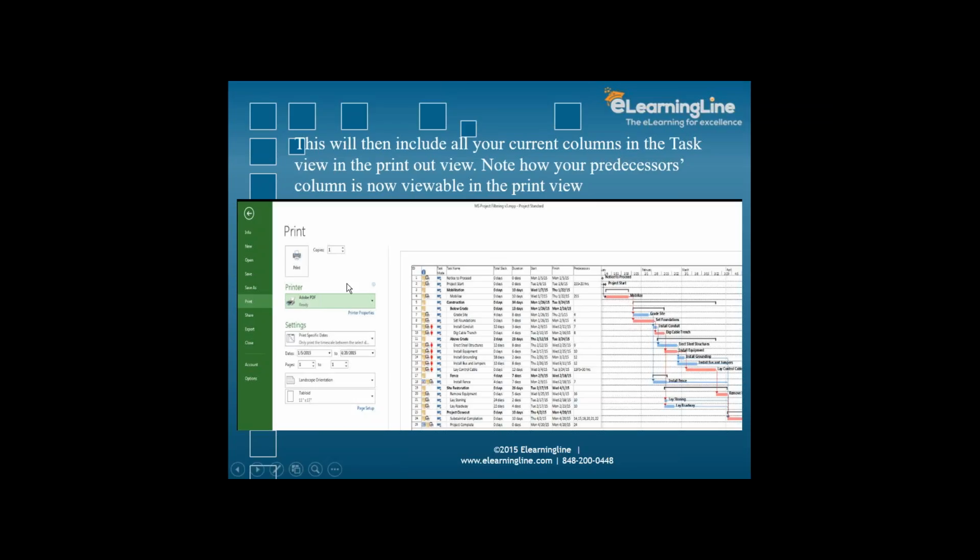And also, not only that, you see here the specific dates. Since you selected this option from the previous scales, only print the time scale between the selected dates. So that means you have defined the date: this is the date I want to see. Page 1 to 1, just one page. Because when you are taking the selected date, you do not want to have 10 different pages printed. You just want to make sure that if your data relies on only the first page, you print only one page. And that is your print setup.